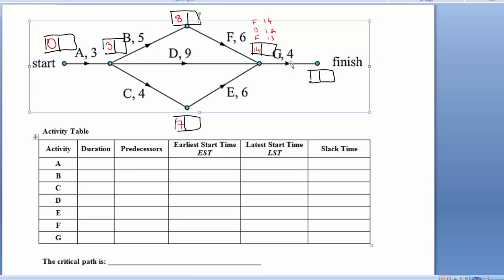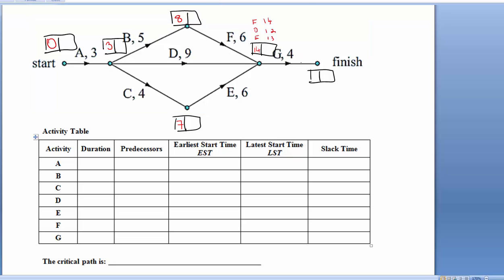Alright, so to finish this forward scan, it's pretty easy. We just do 14 plus 4, and I've lost my pen, so I'm just going to bring that back up again. Review and pen, and write the number 18 in there. Okay, now we'll go ahead and do our back scan.